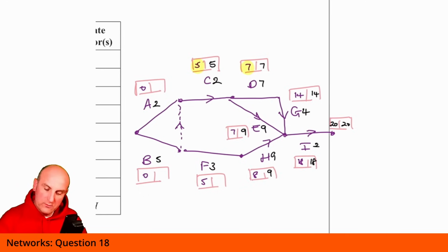Let's go the other way now. We've got H is 9, minus 3 gives me 6. Drawing on that wasn't quite what I meant to do. So 9 minus the 3 gives me 6. So that's going to be 6. Right, what have we got here? So let's draw my arrows on there and there and there and there. I thought I'd missed one. Yep. All right, so what have I got here? So I've got a choice coming in this way. So this is a node. I've got one backing in here and one backing in here. So I've got a choice of 5 or 6.